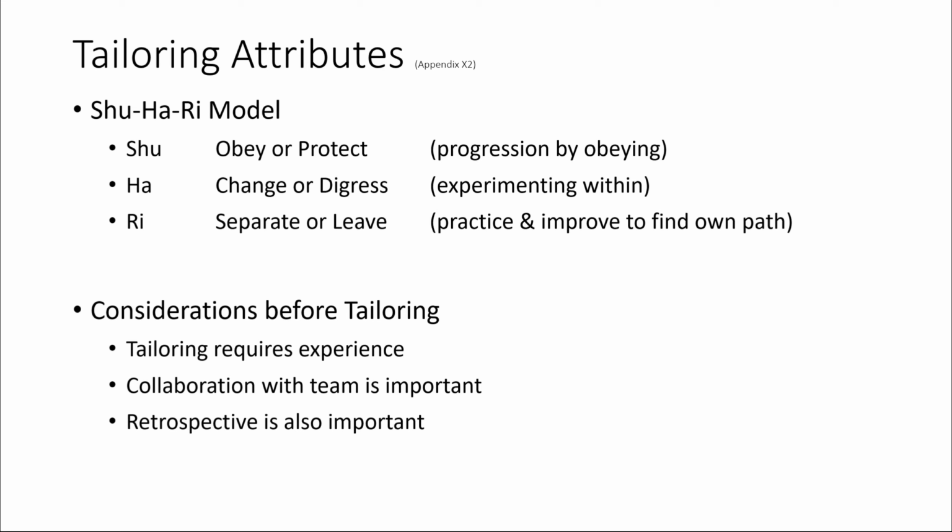A common response when struggling to adopt an agile practice is to consider whether to do it or not. A statement like, "Retrospectives were unpopular, so we decided to drop them," illustrates this issue and indicates a more fundamental problem on the team that is unlikely to be addressed by tailoring the method. The situation will be made worse by omitting the retrospective activity that aims to improve the process.